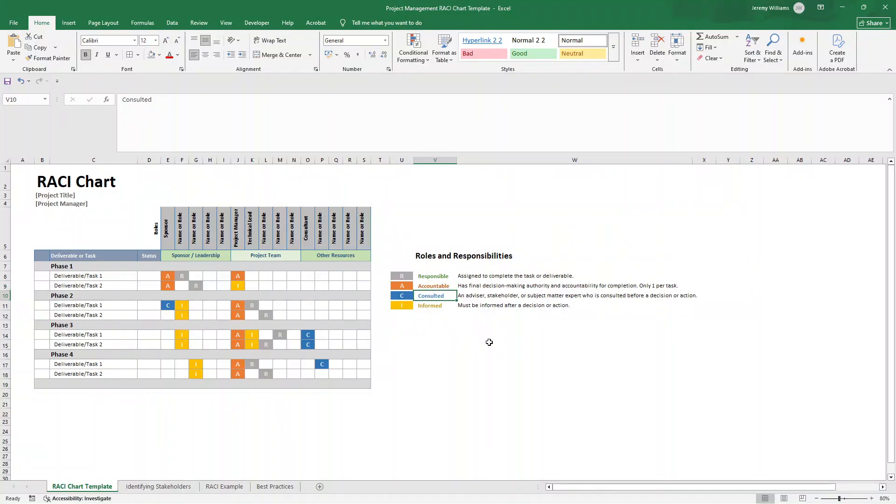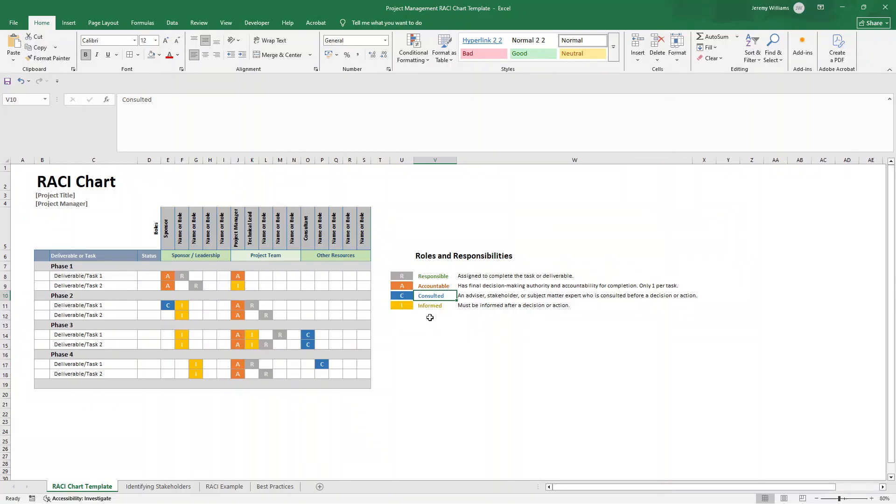C stands for consulted. These are the subject matter experts and stakeholders whose input you need before decisions are made or work is completed. This is a two-way communication. So you're actively seeking their expertise. Lastly, we have I, which stands for informed. These are people who need to stay updated on progress, but don't participate in the actual work. So this is one-way communication. You are keeping them in the loop.